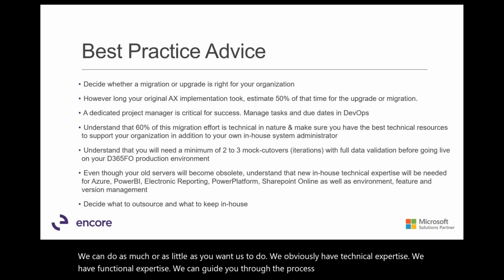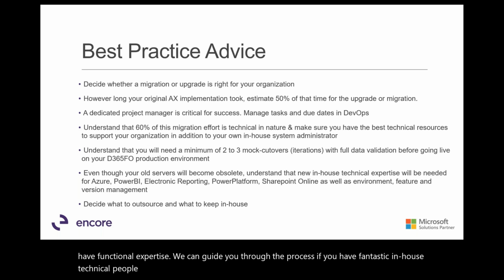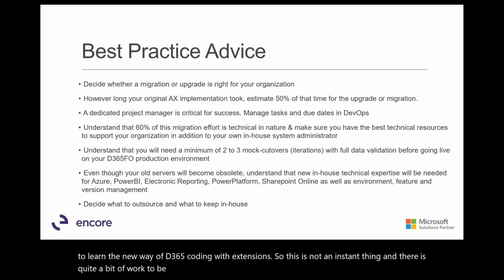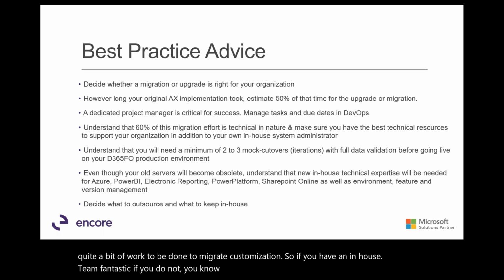If you have fantastic in-house technical people, especially developers, just be aware it's going to take them about 6 months to learn the new way of D365 coding with extensions. So this is not an instant thing, and there is quite a bit of work to be done to migrate customization. So if you have an in-house team, fantastic. If you do not, you can outsource it and use us as your partner to help you with that.